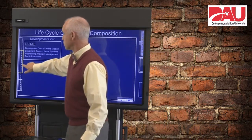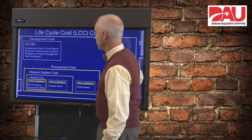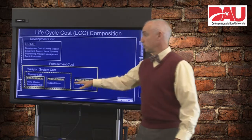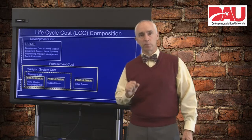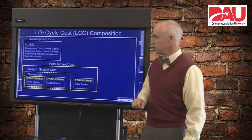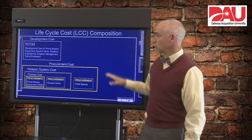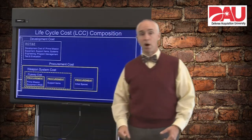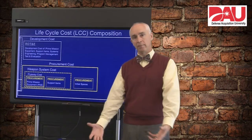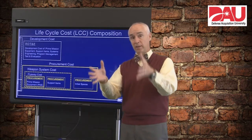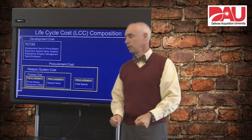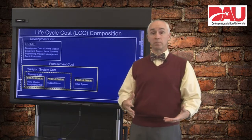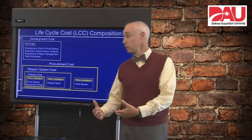We also have costs to produce a system, and those come in some different categories. Each of these is one appropriation — procurement, shown in yellow here. So the total procurement cost we can break up into different categories. The flyaway cost is just the cost of the prime mission equipment — that aircraft sitting there on the tarmac. That's what we call flyaway cost. Then you also have to have support items, so to get the weapon system cost, you add the support item cost to the flyaway cost.